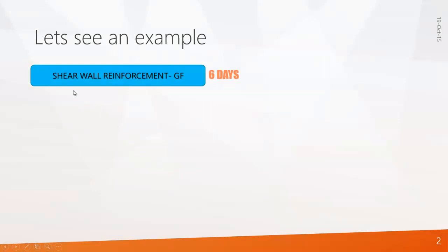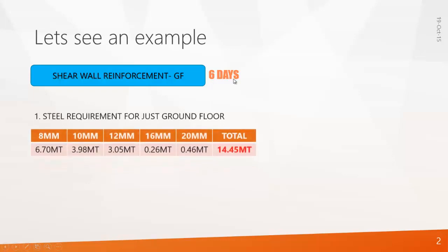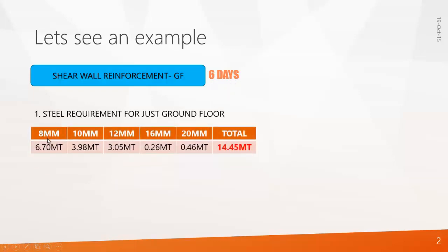Look at this activity: Shear Wall Reinforcement for Ground Floor. To perform this activity, we require 6 days. To do this activity we require steel — 8mm: 6.7 metric ton, 10mm: 3.98, 12mm: 3 metric ton, 16mm: 26 metric ton, 20mm: 0.46 metric ton, and total we require 14.45 metric ton. I arrived at this calculation from structural drawings, and we require binding wire of 500 kg.